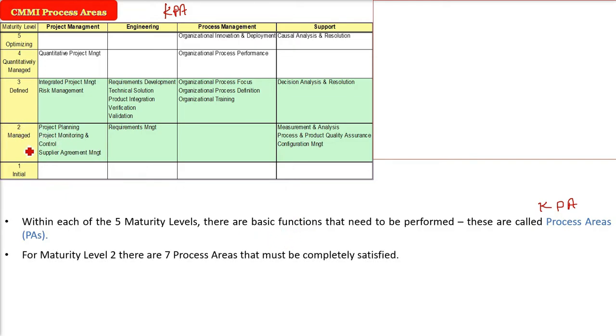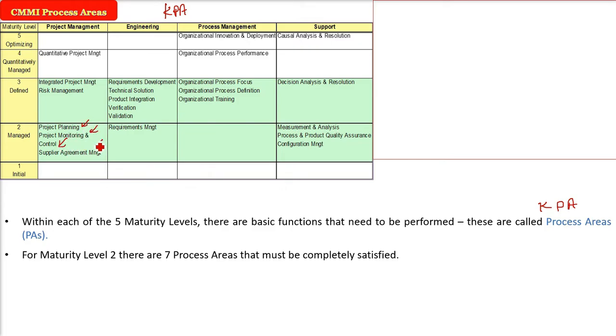If you see, first initial level, there are no process areas. In the second one managed, we have seven process areas. You see here, project planning, project monitoring and control, supplier agreement management, requirements management, measurement and analysis, process and product quality assurance, configuration management.